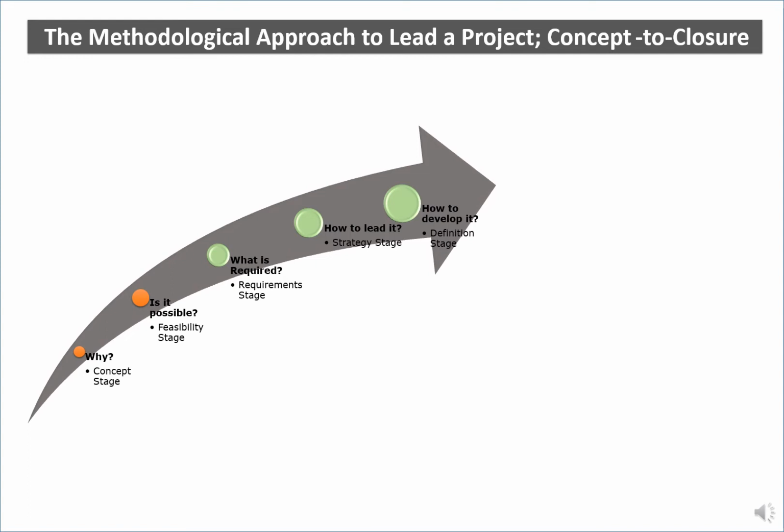With the detailed plan, we get the final details, and now we have enough information to be able to predict the final cost and schedule with relative accuracy, which means plus or minus 10% probably, or 5%. And that usually gives enough confidence to the organization to approve the project to go into the implementation phase or the